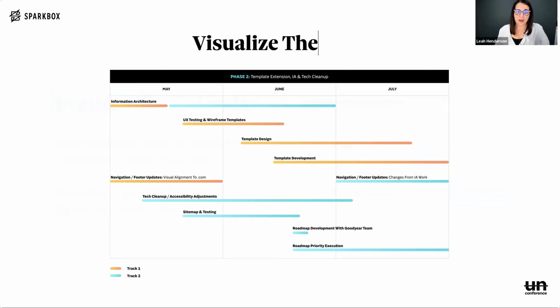Lastly, now that the team has evaluated each of the considerations, they need to visualize the plan in a succinct, clear visual. Each of these should focus on displaying the general tasks, the overlap of additional items, and an estimate of how long that effort will take. Roadmap visuals should be customized to communicate to stakeholders effectively. For example, this roadmap I'm showing was needed to not only depict what tasks are being completed, but also that there are 2 different teams working on 2 different goals at the same time. This graphic displays how the team's tasks will overlap and work together simply by changing the color and showing each track on its own.